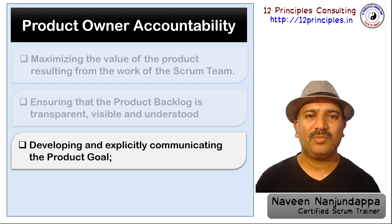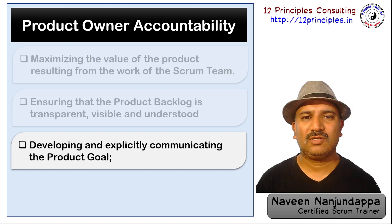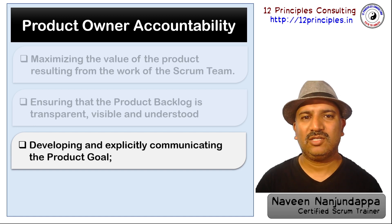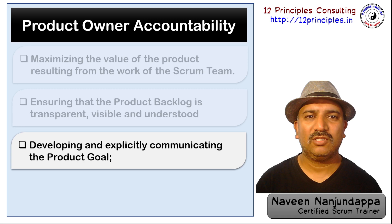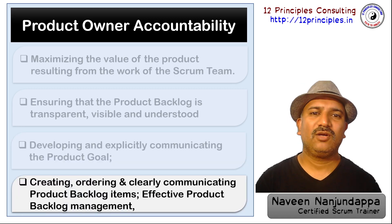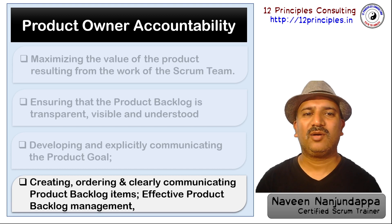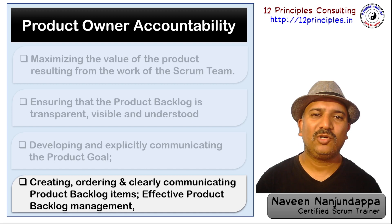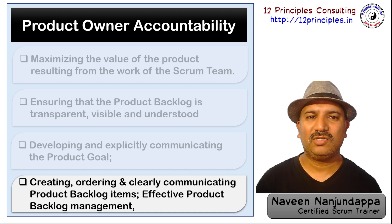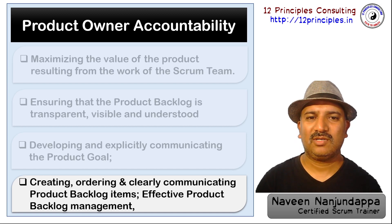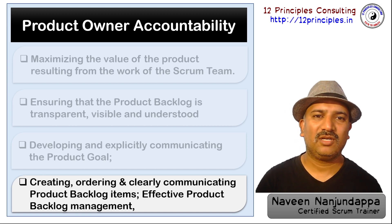The product owner helps in developing and explicitly communicating the product goal and the sprint goals and objectives. It is important that the product owner acts as a navigator towards the goal and the team members are the engine to run towards the goal. Creating, ordering, and clearly communicating every product backlog item to the team members and stakeholders becomes an essential responsibility of the product owner, and they are accountable for getting this done every sprint.